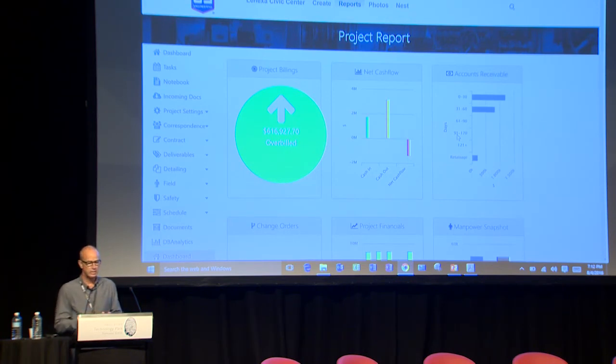Okay? This is a SharePoint environment that can give you just great information. So we're going to talk about SharePoint. This is pulling directly from our ERP. Now, if you think that we're being unfair by overbilling, if you look here, we're actually negative $1.4 million in cash on the project. Okay, so I can actually have a good discussion with the owner about, yeah, we're overbilled by $600,000, but we're underpaid by $1.4 million, which is well more than our retention on the project.